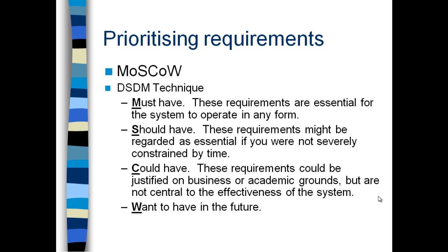Should-have requirements are not something absolutely required, but it is always better to have them. If there is any difficulty, we will try to achieve them within the delivery of the project, because they definitely bring some value to the whole system.